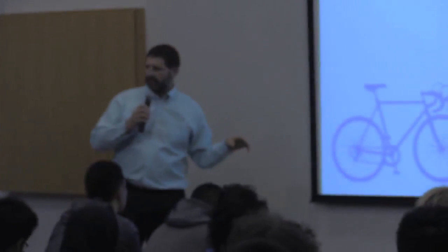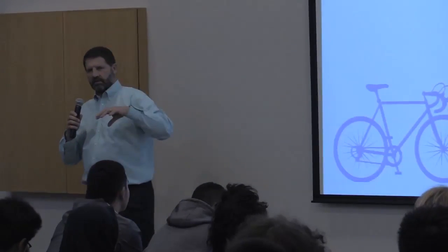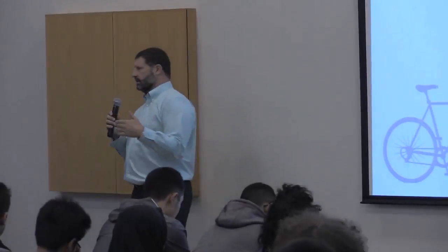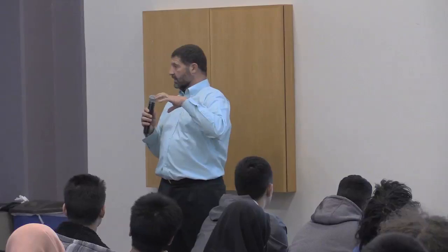Ideally. So scope creep is when you have a project and you start it and you have maybe 10 requirements. And then maybe it's a 6-month long project and every month they add another requirement. Now you have like 16 requirements, and then the 6 new requirements make you throw out 5 of your old requirements, and you have to change it all. So, scope creep, the best thing to do is reassess your schedule at that point.